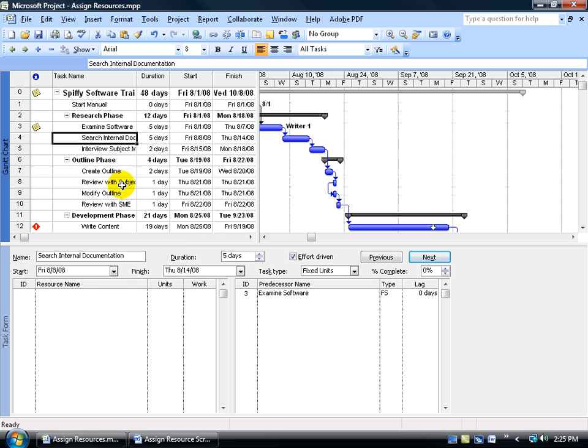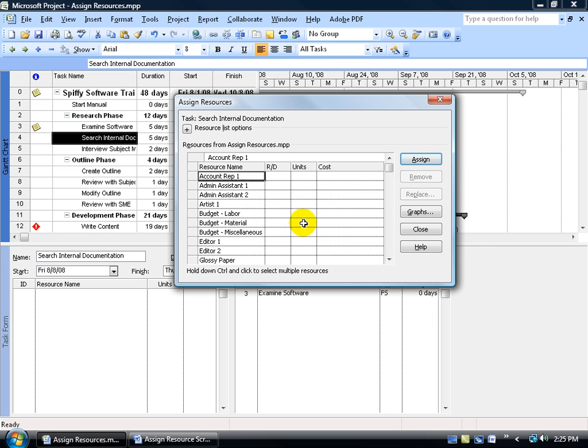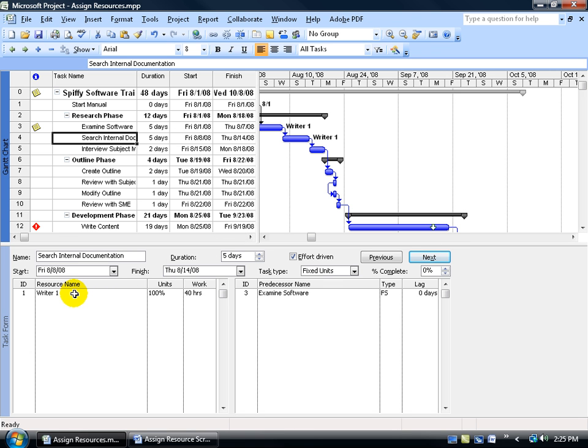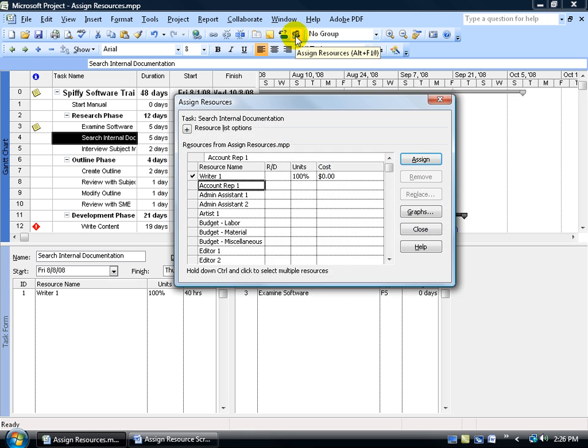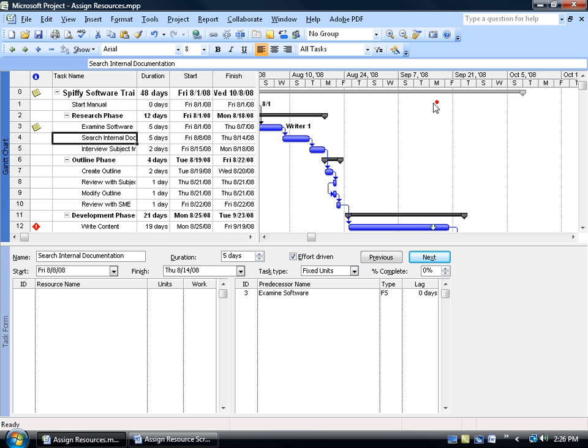Let's go to Task 4. Now down below, you can see I have no resources assigned to search internal documentation. Well, if I want to assign Writer 1 to this task, I can do it one of two ways. I can either come up here and again click on the Assign Resource button and scroll down and select Writer 1 again and click Assign. And then close out. You can see that it now pops up down below. Or, now I can hit the Undo button if it was a recent edit and undo that. Or, if I want to unassign this, go back to the Resource button here, click on it, select Writer 1, and remove. And close out. And now it's gone. You can see that Writer 1 is no longer assigned to the second task.